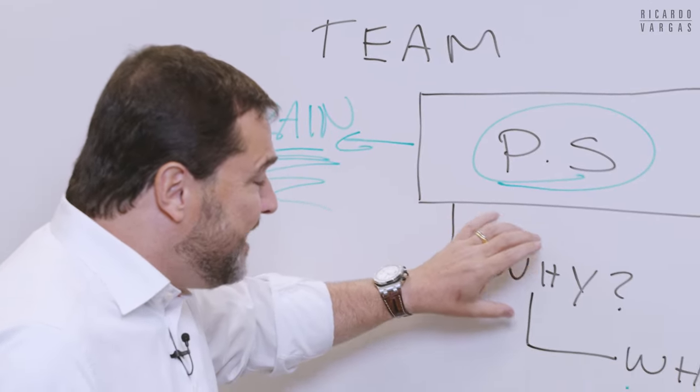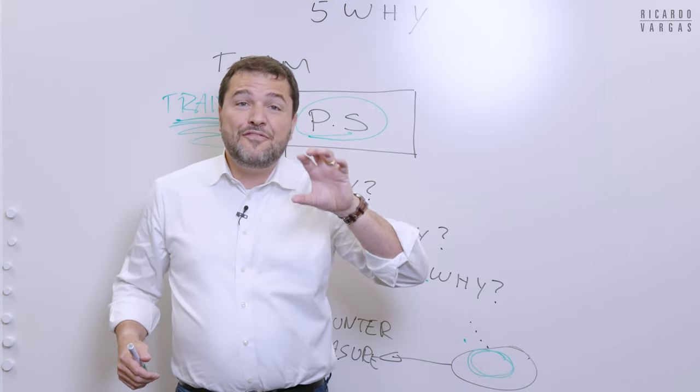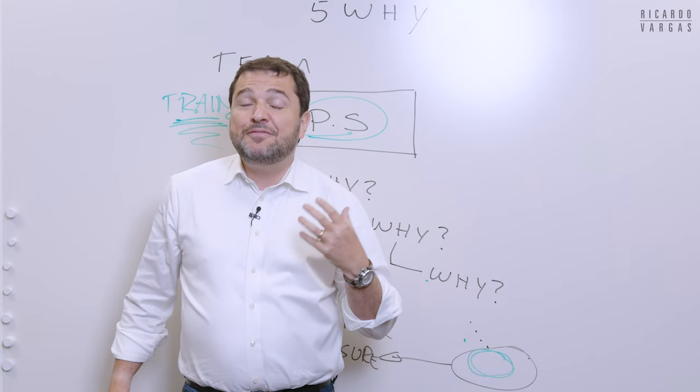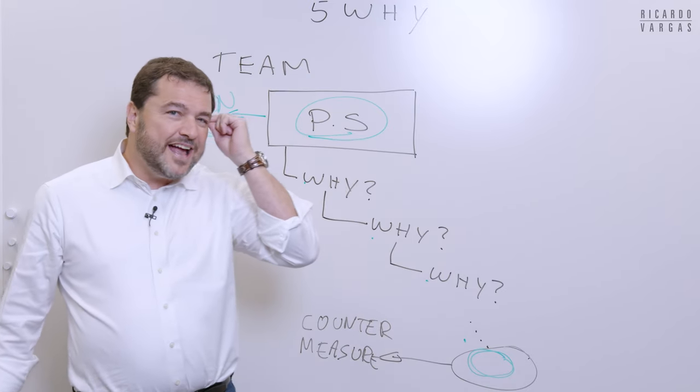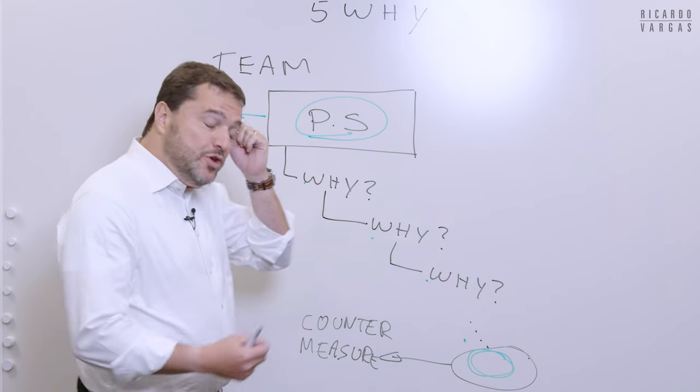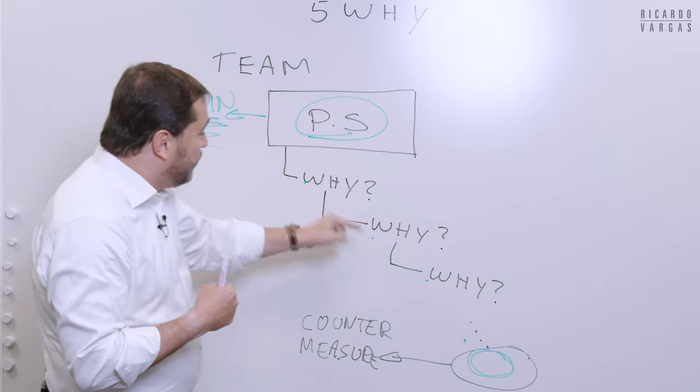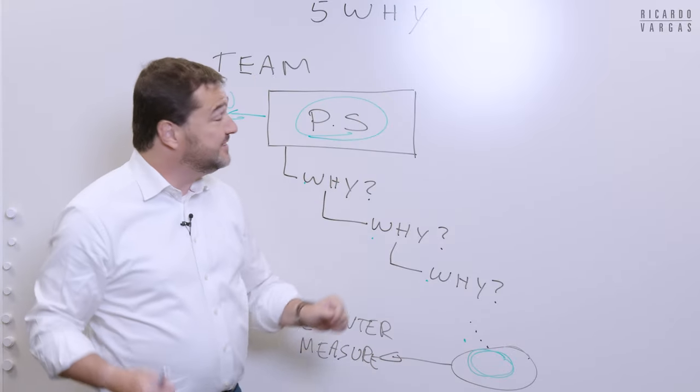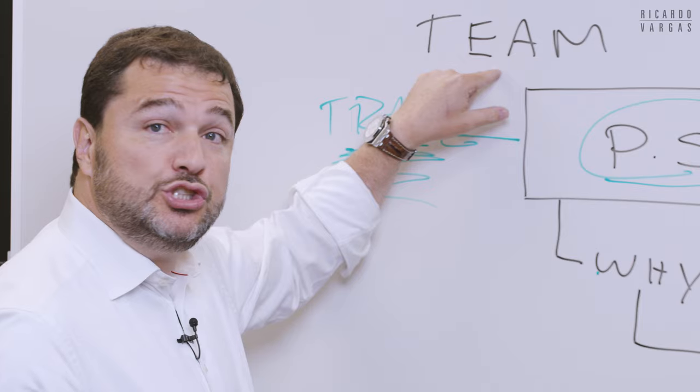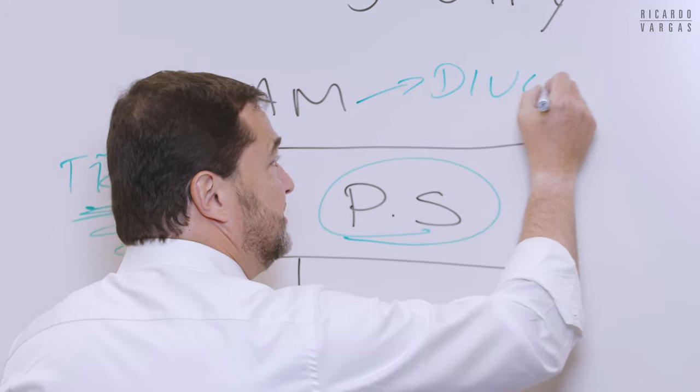And why you need to have a team. Because many times on this why, why, why, you will face a cognitive bias. And then maybe you already have in your mind, it's because of training. And you already come up with the answer you want to hear. And then you ask why just to justify that. This is why you should use a team. And most of the time you should use a diverse team.